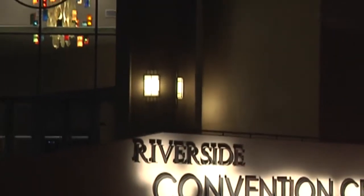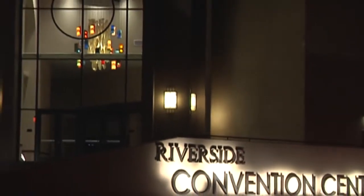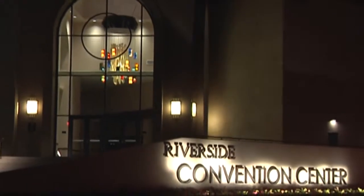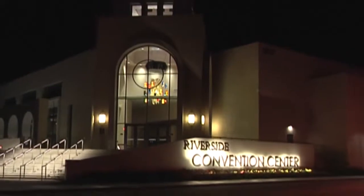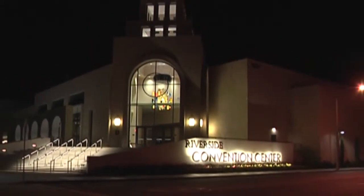And during the course of the project, the exhibit hall lights, for instance, were supposed to be a T5 fluorescent. But during the course of the job, the LED product came on the market, and we were able to utilize those in the exhibit hall. And the outside lights were all fairly new, too, within 6 months that we started. So we started 2 years into the project, 2 years design build, and then within a year, LED had moved so much, the downlights were on the 3rd generation by the time we picked them out and used them here.